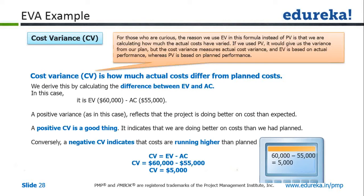We are going to calculate our cost variance. The cost variance formula is earned value minus actual cost. The earned value — the work we have done — is worth $60,000, and the actual money spent so far is $55,000. So earned value minus actual cost gives a positive value of $5,000. Any positive value with respect to cost variance is good — it means you are spending less than what you had planned for, which is definitely good news but a rare situation in real life.